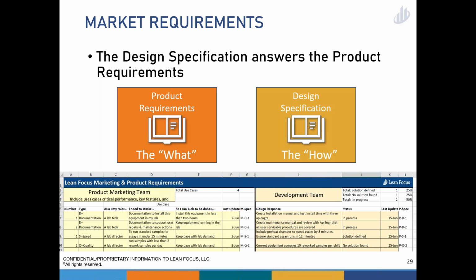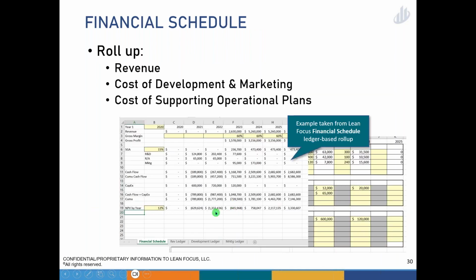And so we know with great discipline what customers expect, and we know precisely how we're going to fulfill it. Or if we don't, we have a place where we can mark the status here, no solution found, and we can then use the time to go make sure all those gaps are closed before we start the project. You don't want to be closing that gap 60 days before launch. And so we call this the PRD MRD, or the Product Requirements Marketing Requirements document. But the idea is, if I have this and it's diligently done, I know what this product has to do.